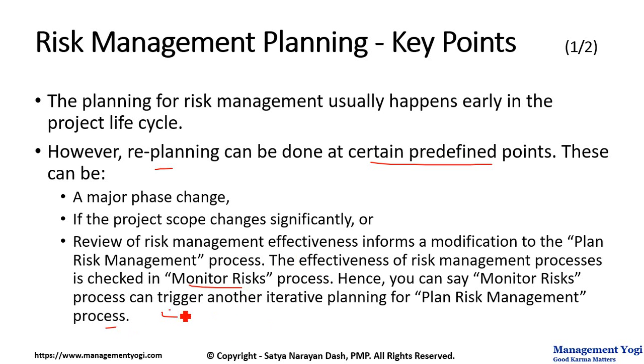This is very significant. So even if you are in the monitoring and controlling process group, under which monitor risk is there, this can trigger, and you will come back to the planning process group where you are going to do replanning with respect to risk management. That is, you are going to again go through the process of plan risk management.